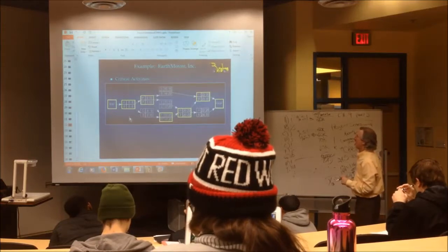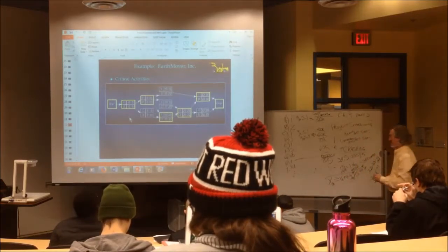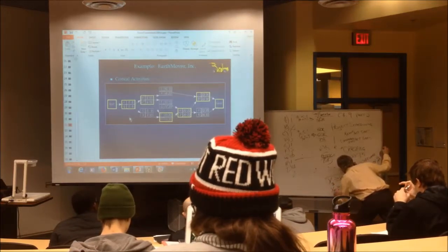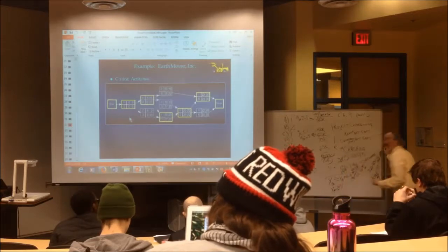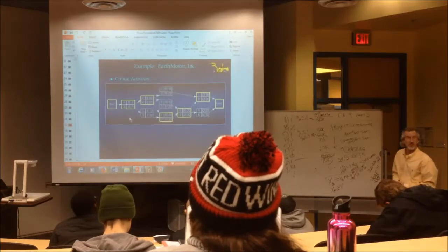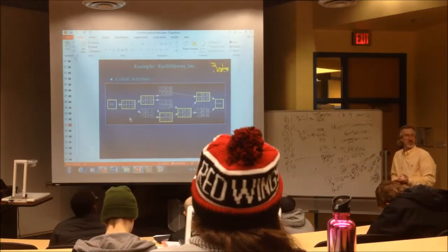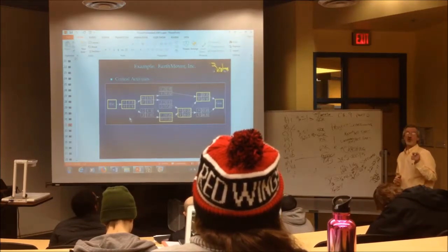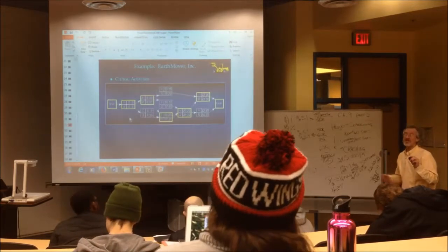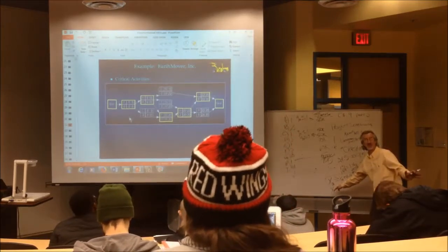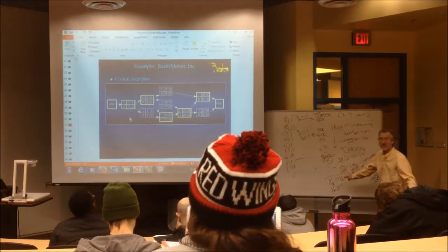Let's try F. Are you ready? The x variable for the activity we're writing it for is greater than or equal to the x variable of whatever activity precedes it. So what would be the x variable? B and C. B or C? Which one? Whenever an activity has more than one activity preceding it, you have to write as many constraints for that activity as however many precede it. So I'm going to start by using B, right?